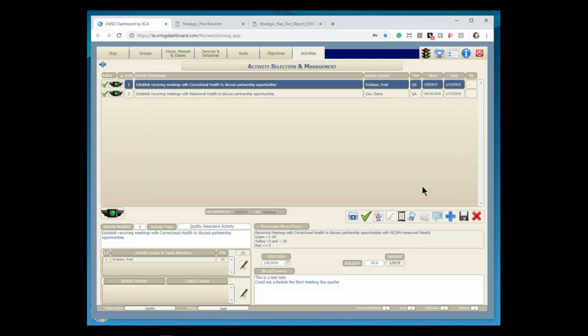they're kind of variable, because it's going to depend. A lot of people want to have the percent complete tied to the traffic light, which you do in a QA activity. But for most of them, let's say you're halfway through your time cycle. Let's say it's a fiscal year and you're at December 31st, so you're halfway through the fiscal year, but you're only 50% done. Well, you're on track, right? Because you're halfway through the time cycle and you're halfway done means you're on track. But some people would say, well, you're only halfway done, it should be red. Well, no, you're in progress, you're doing things right, you're just at the right point.